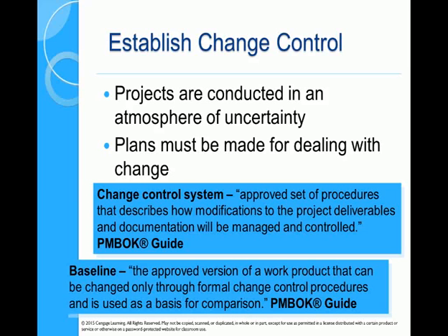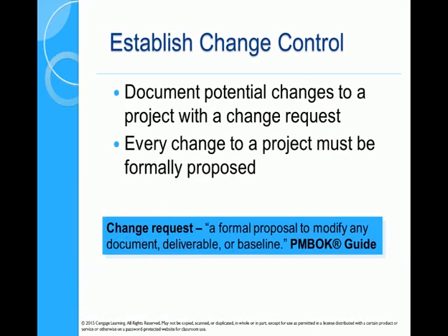We talk about baseline. Baseline's at the planning stage. These are the work packages that we choose to do. This is when we choose to do them. Our baseline is made up of 3 parts. That's scope, schedule, and cost. Just talking about baseline here now for the scope. It's the approved version of the work. Okay, it can only be changed through a formal change. So if the change is substantial enough, we need to re-baseline. We need to say we're no longer building patio A, we're actually doing something slightly different. Here's what it will look like.